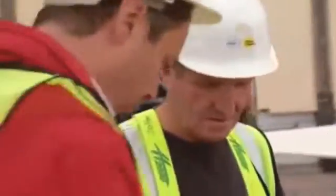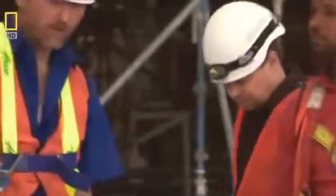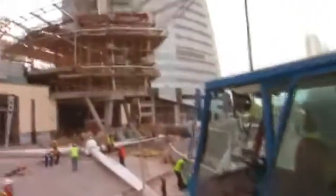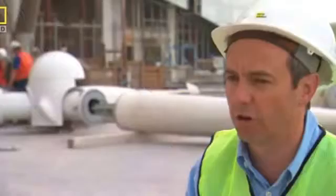That top bridge, the wind is always very strong as you get nearer the top. We've talked about it this morning, and we've looked at the weather forecast. We think we've got a window of opportunity to get bridge 3 up. It's going to be very close. The conditions need to be perfect. If we get a gust just as we're about to pin, and it rips the pin out, then you can't control it. You haven't got the strength to control something like that. You have to make sure it's perfect. It's not worth taking a risk.